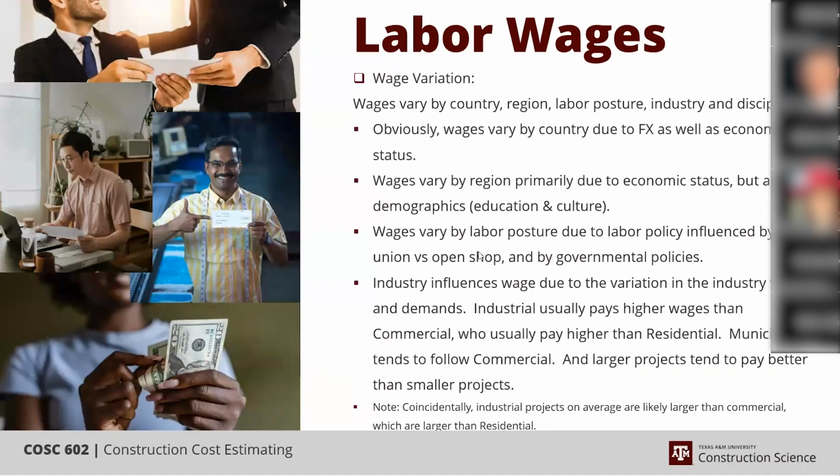So that's the variation in type, but then there's other aspects that change the wage rates too. Overseas, you've got foreign exchange. This is more of an overseas, country by country thing, but you actually have regions within countries too, where the economic status is different. If the country's not as industrial and developed, or the demographics, the education is not as high, so the skill levels aren't as high. Labor posture, union versus open shop,